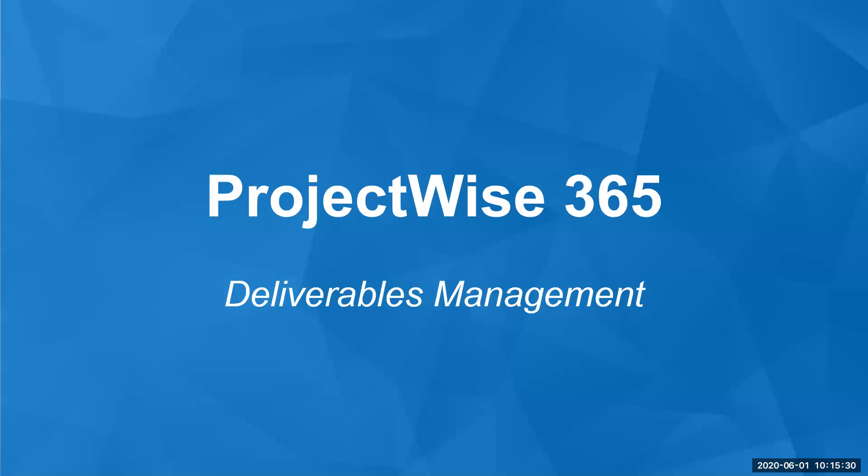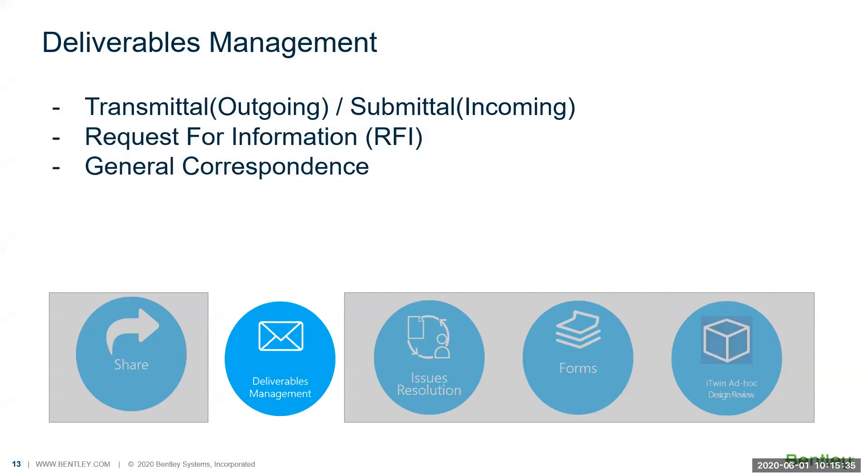The next module I'm going to touch on is deliverables management. Deliverables management consists of transmittal and submittal. In our terms, transmittal is outgoing, and submittal is incoming. When people send documents to you, they are called submittals. When you're sending out, they are called transmittals.